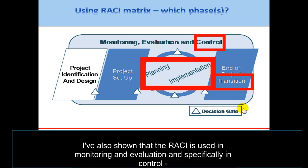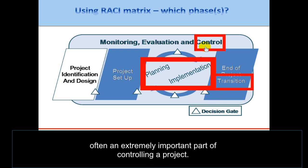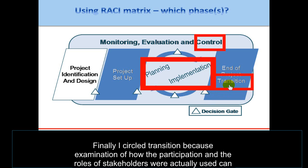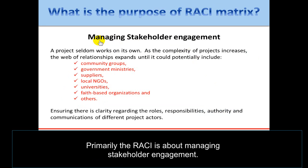The RACI Matrix is also used in monitoring and evaluation, specifically in control, because the management of stakeholders and communication to stakeholders is often an extremely important part of controlling a project. Transition is also relevant because examining how the participation and roles of stakeholders were actually used can be part of the reflection process to improve future development interventions. Primarily, the RACI is about managing stakeholder engagement.